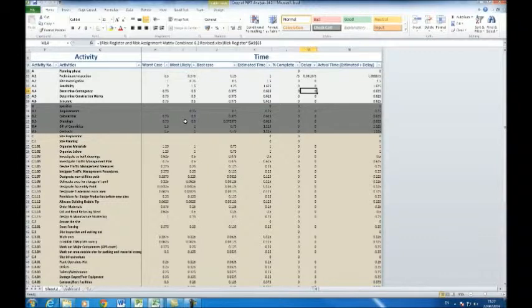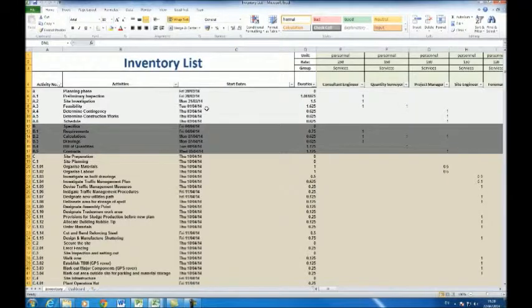3. Change the time durations in the estimated time column of the PERT program, and click Save. Note this overrides the inbuilt formula for estimated time, which takes account of worst, most likely and best case time values. It should be noted that any changes made, in terms of resource usage, must also be manually changed in the inventory. Click Save when complete.